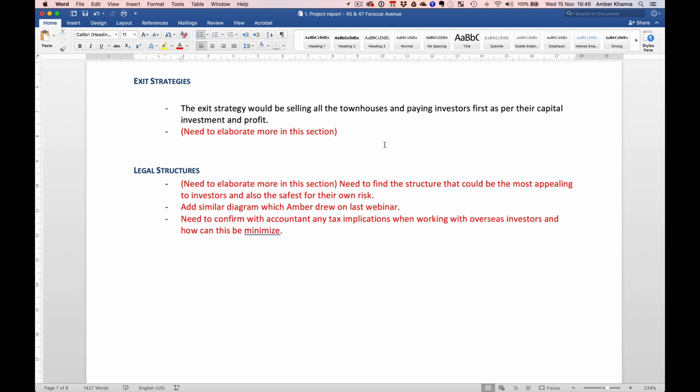However, I keep talking to my banker, and he said, look, now we are doing 65, 66%. So in my feasibility, I go with 60/40 now, just to have a little bit of buffer on the side, that if there is some scenario where I need money, I've got some money. So always have a good buffer sitting on the side. You cannot afford to be in a project and then run out of money halfway through.